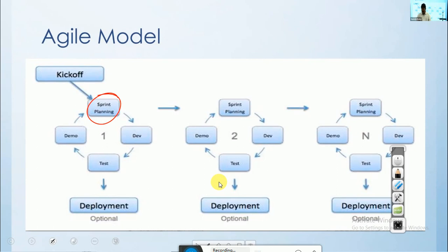Once I check and review the code, see this output, then I assign the work in this. From tomorrow, you start executing the test cases and make sure by tomorrow evening, all defects are submitted. You take 1 day, whatever defects you receive, resolve and give the modified version by day after tomorrow evening. Next day, 1 day, you do retesting and regression testing. Again, we have a final meeting by Friday.